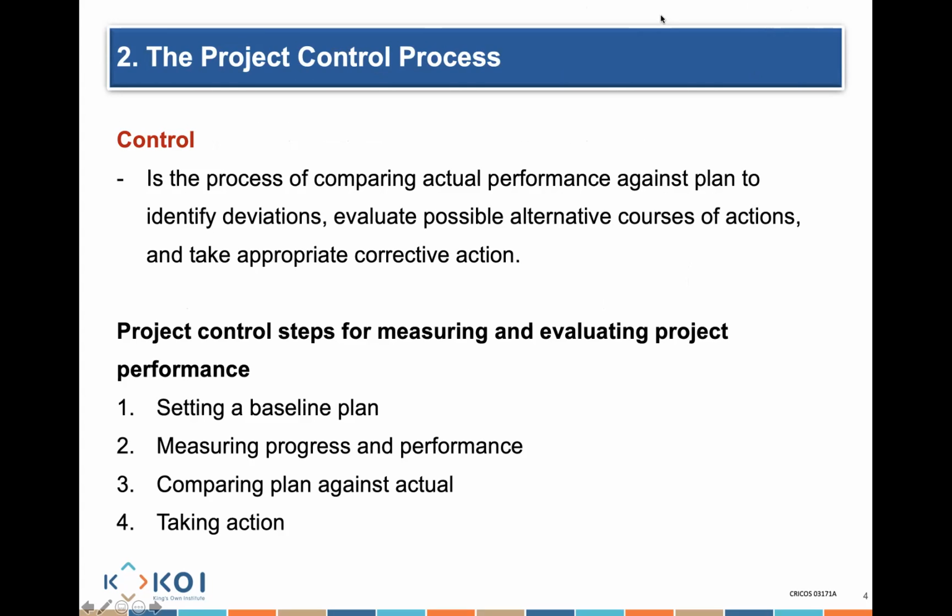Now, ladies and gentlemen, control is a very, very important word. And when I talk about control, I need to create control over my project. What does control over my project really mean? Control, guys, means I want to compare. Compare what? I want to compare how I'm performing today against the plan that was created that told me how I should be performing. So basically, it's about comparing my actual performance to my planned performance.